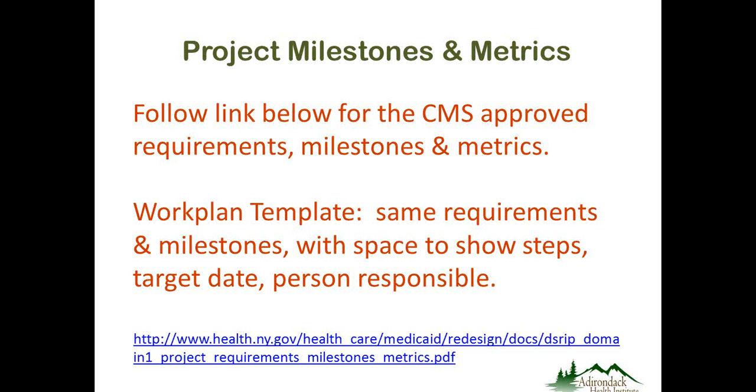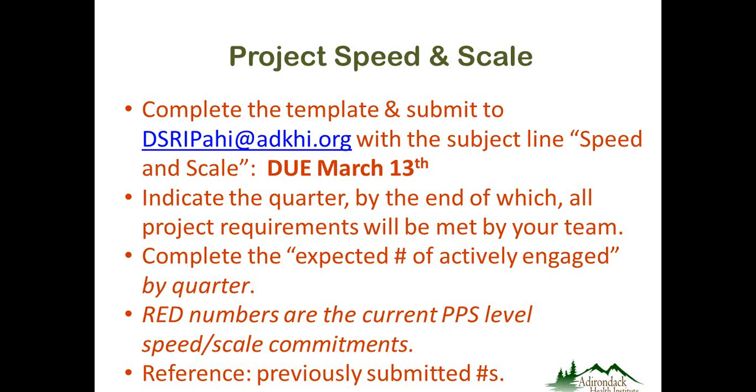And the work plan template that you'll be receiving on the 6th simply shows those same requirements and milestones that are in the document, and there's just a space underneath them where you'll put in steps that it takes to get to those requirements, as well as a target date and a person responsible for each of those steps. So that's work planning.